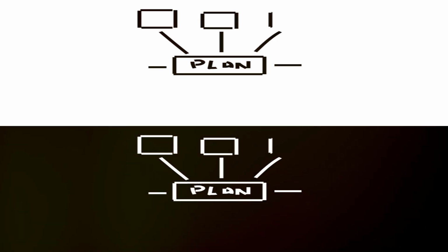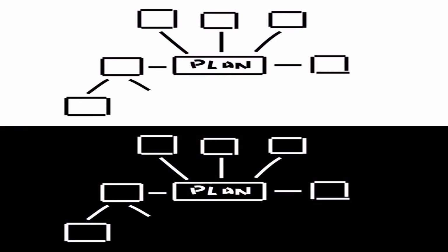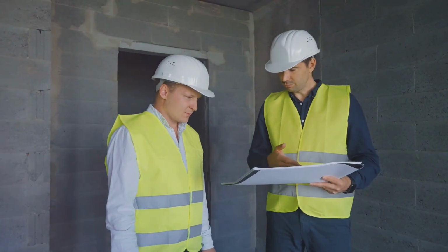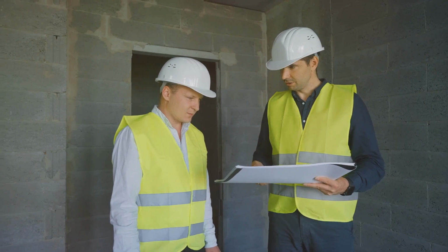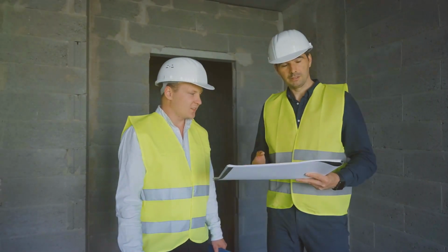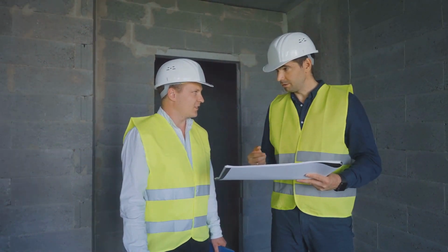The key point here is that deterministic logic doesn't allow for conditional or probabilistic network branching. This means that the sequence of activities doesn't depend on any conditions or probabilities. There are no if-this-then-that scenarios. Everything is planned and fixed from the start. There's no room for guesswork or uncertainties.